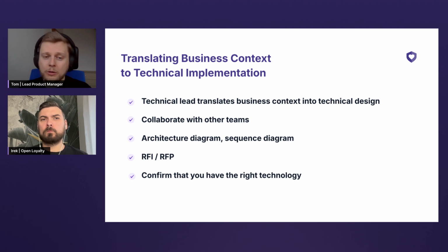So, right here we assume that you go with a SaaS company, so an API-first engine, right? Imagine that if you were going to build everything in-house, you would need to do a separate sub-project inside your loyalty project to spec out, analyze and design a separate component just for loyalty, all those mechanics.